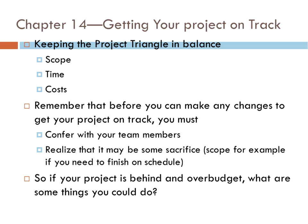Well, sometimes that's impossible. If you have to meet your deadline, you might have to increase your costs, right? Because you may have to add some more people. If you want to meet the deadline, you may have to reduce the scope of the project. You may have to eliminate some things, like they show you in the example in the book.